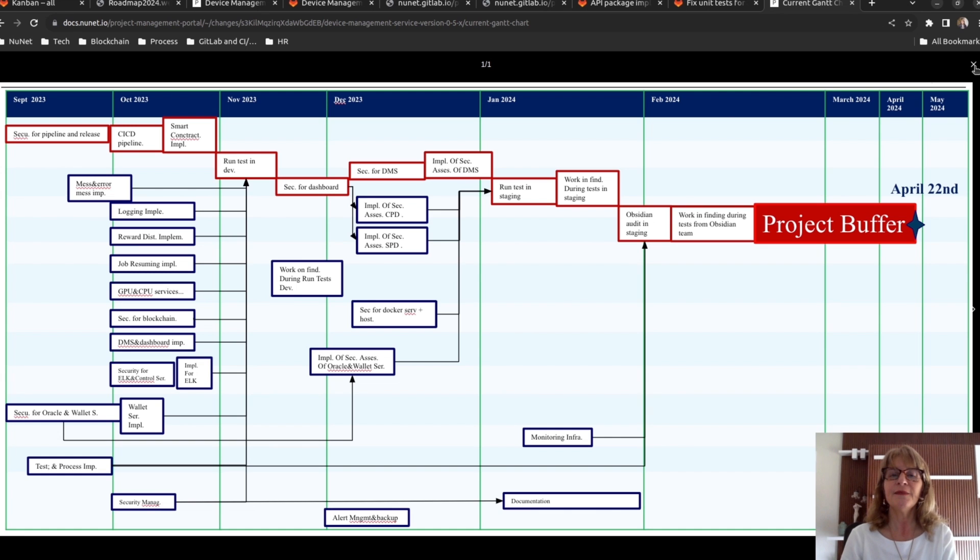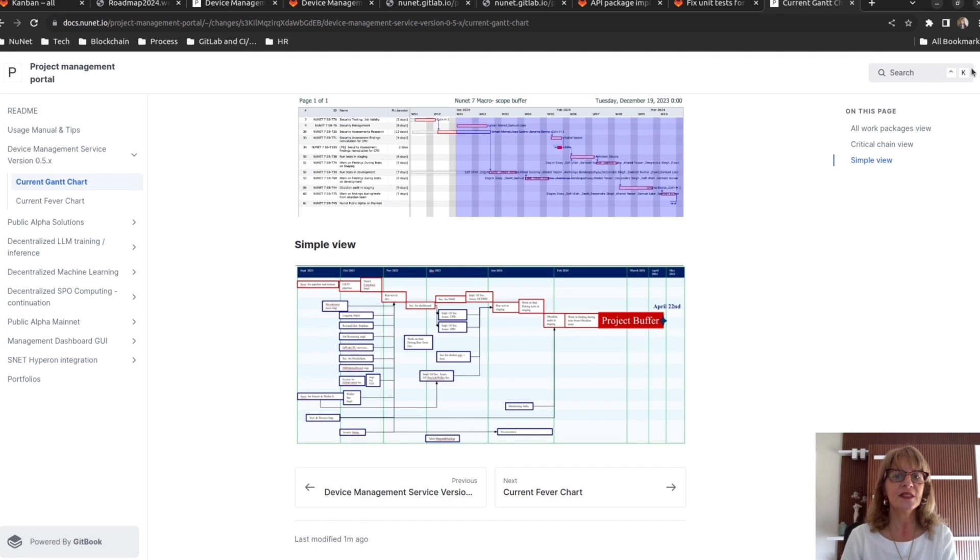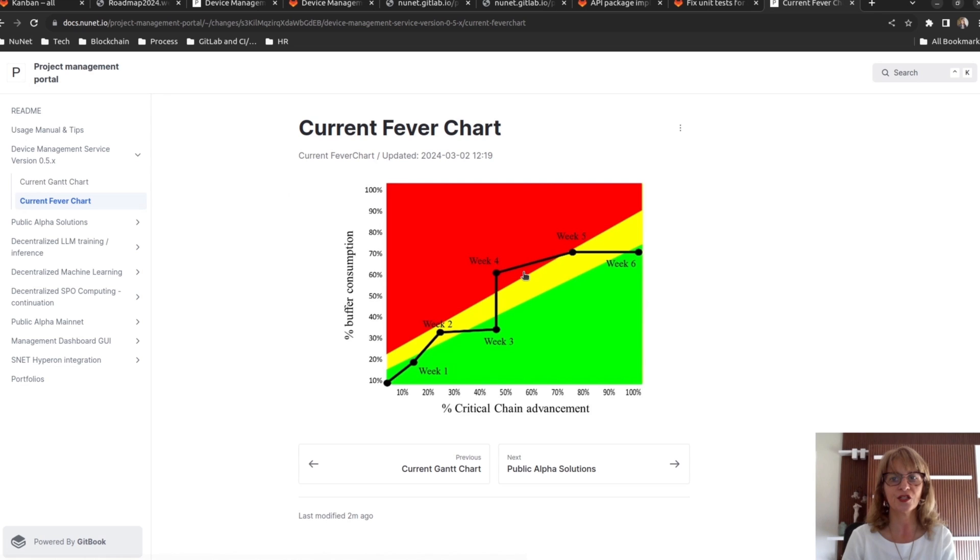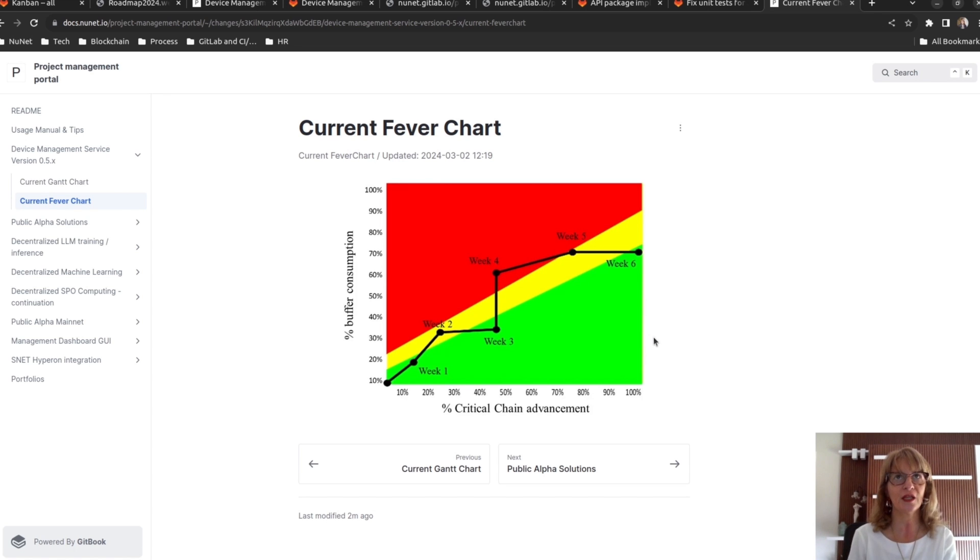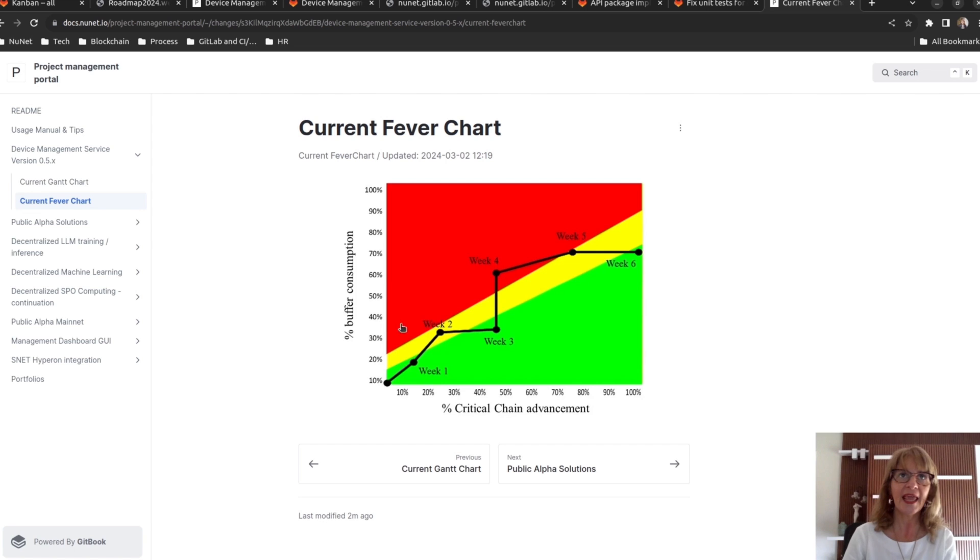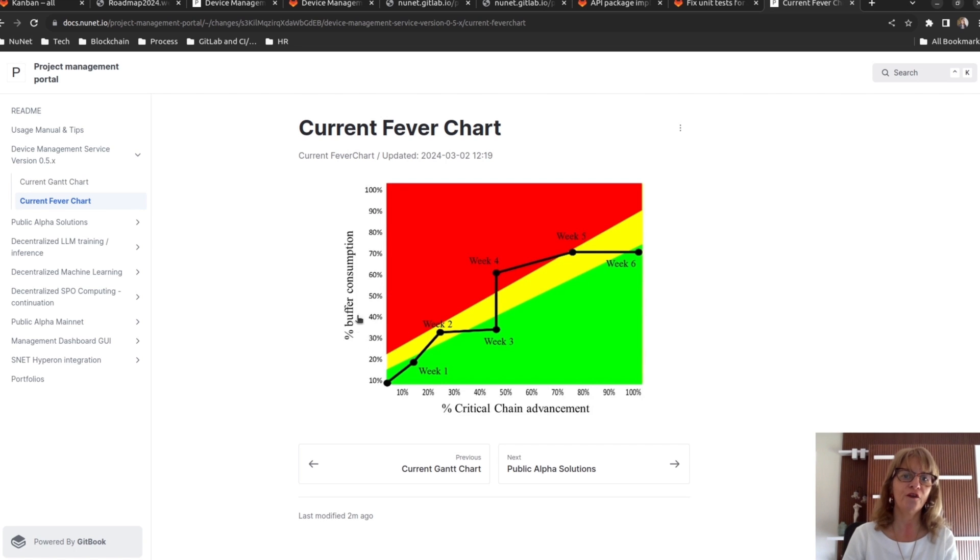The CCPM uses a simple visual indicator called the Fever chart. The Fever chart is built by measuring the progress of the project. I mean the percentage of achievement of the critical chain and the consumption of the project buffer.